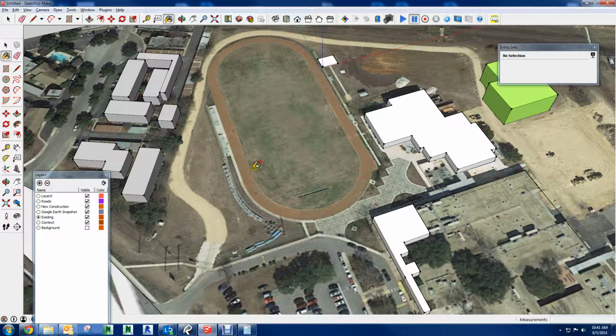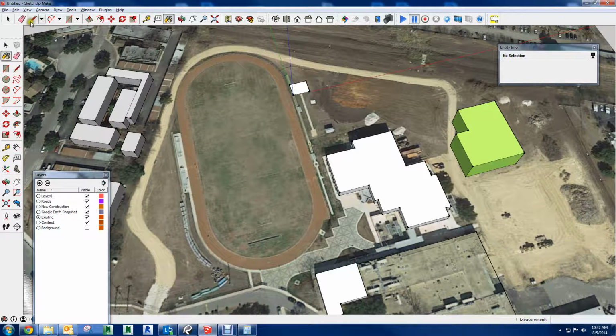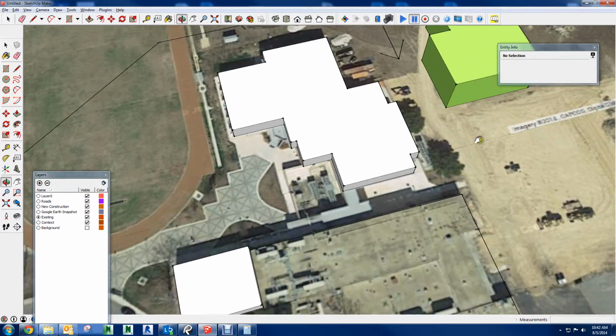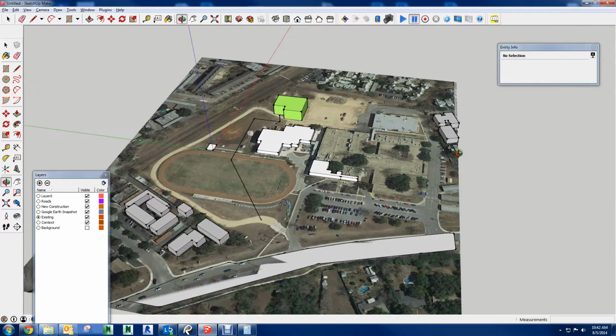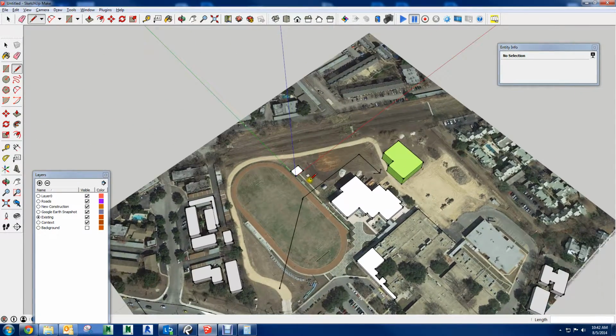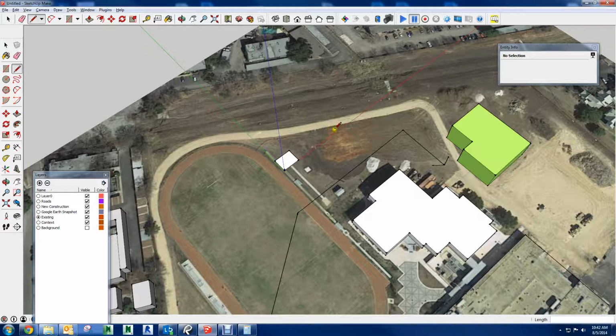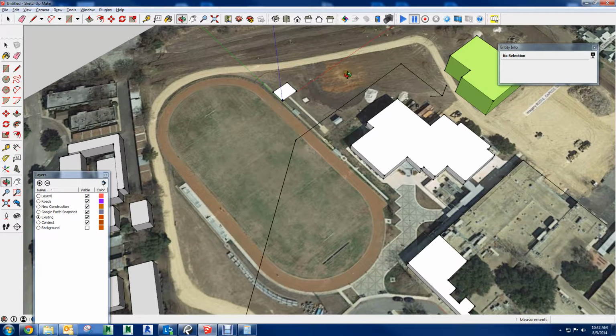And this is where the markups come into play. You print the plan view of this, and he's going to mark up, like, this is going to be our construction entrance. I want a road that goes from here to this part here, and it's going to give us access to the building here. This part's going to be our lay down area, our material staging area. All the subs are going to park here. This is going to be the GC offices. We're going to put portables here. All that.